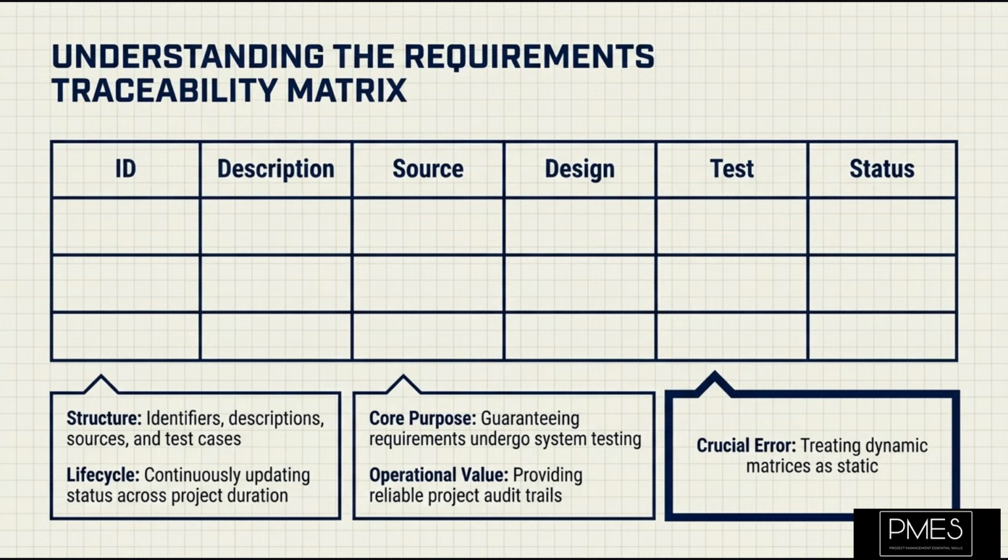Prototypes are working models of a product. They allow stakeholders to experience a proposed solution and provide feedback, helping to refine requirements iteratively. A clickable wireframe for a new website is a prototype that helps collect requirements by showing, not just telling.